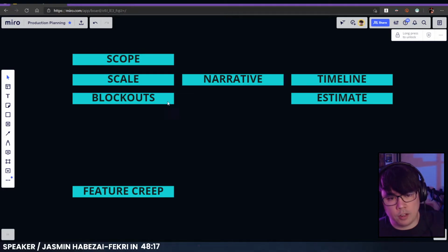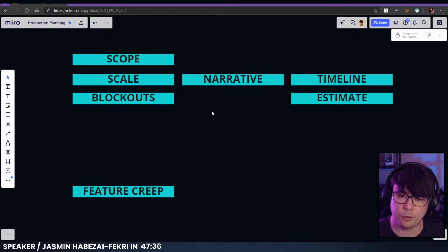And by doing all the blockouts, once you start making them and actually building the art, if you're feeling like, okay, my estimates are a little off, you can see it immediately, because you'll be like, okay, I built this prop. I thought it would take, I don't know, three working days or 4 working days. So 32 hours. And it took 40 something, right? And you see that with each asset you're building. In order to descope, this is where cutting comes in, right? This is like you're cutting assets that are nice to have, but not needed to fulfill the narrative.